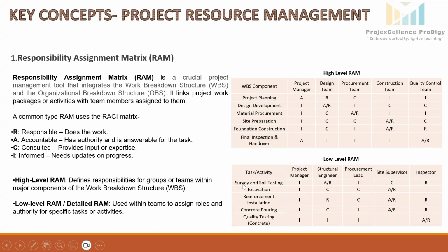So here we can see the task or activity under this foundation construction WBS is survey and soil testing. The structural engineer is accountable for testing while the inspector verifies the quality. Similarly, for excavation, the site supervisor leads this phase, while the structural engineer and procurement lead provide the input. Similarly, for quality testing, the inspector leads the testing, ensuring all parameters meet the quality guidelines.